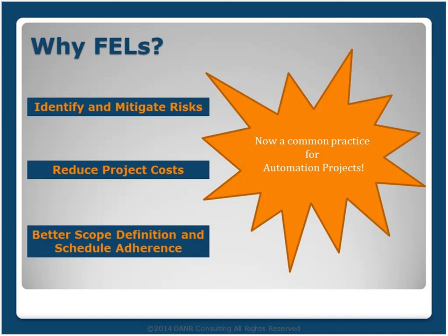So how do clients benefit from FELs? Well, first of all, FELs enable risks to be identified early and mitigation steps to be taken through design, engineering, and planning activities to minimize their impact. This, in turn, avoids costly issues later in the project and frequently reduces the overall project cost. FELs also provide better scope definition early in a project, resulting in more realistic schedules and budgets.